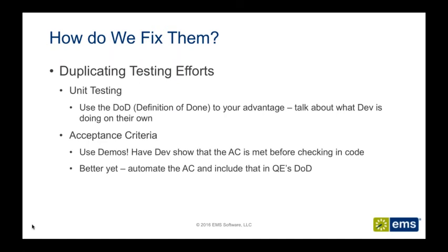Because that term was such a well-known term, we've brought that back into the disciplines that make up our project teams here. So we use the definition of done to not only determine from a product standpoint what done means when we are ready to deliver and ship something, but we then talked about what the definition of done means to dev. We wound up using a series of kickoff meetings and what I would just call a map, which looks like a PowerPoint presentation. And this talks about all of the things that each discipline does when they say their piece is done.